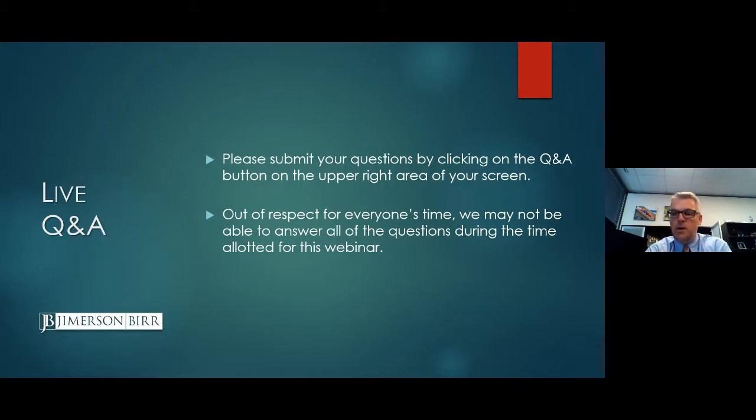Make sure that if there are claims that you have previously reserved, talk with your team, make sure there aren't any claims that you haven't yet noticed or documented, to avoid any argument that once you sign that change order, all those prior claims or the existing claims, other than the extra work that you're dealing with on that particular issue, are still in play.